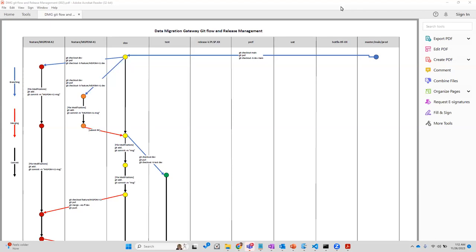It is split into chunks, and small groups are made. Let's say we have 70, so we will make groups of 10 people each. So seven groups are made. That group is called a pod. Okay, pod, P-O-D. Now, what is the combination when forming a pod? Generally there will be one Scrum Master. The Scrum Master goes into the group. I'll explain what the role of Scrum Master is and what Scrum is.